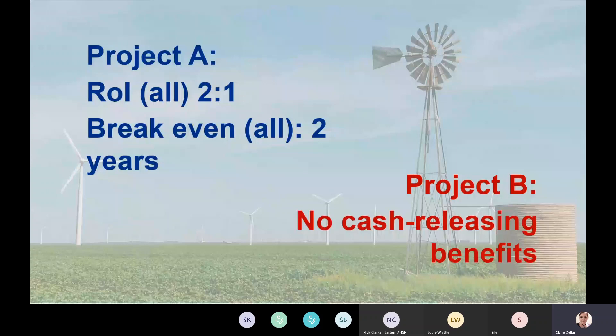It isn't always the financial or economic case that wins out — it's a combination of all of them. That's why it's important to write this as a single case rather than separating chapters out: the accountant writes the financial case, the benefits person writes the economic case, the project manager writes the management case. We've got to write it as a group because our options may score higher or lower in different parts, and we need to come to an overall conclusion.